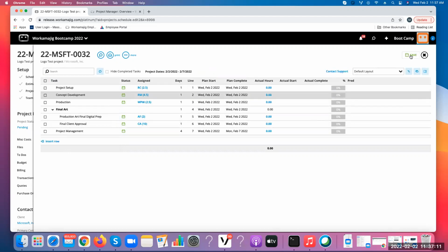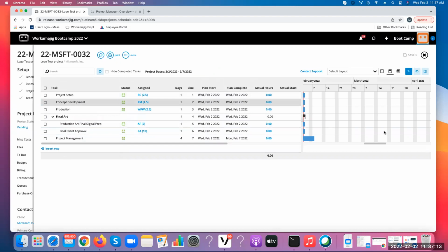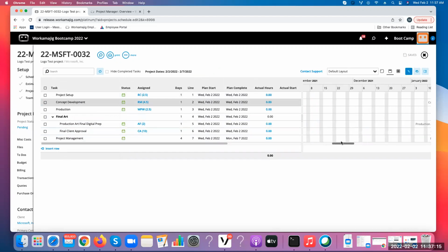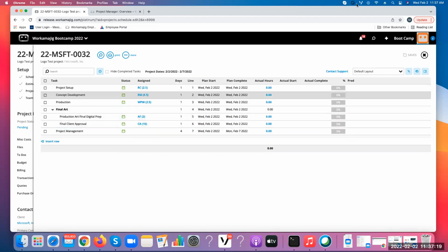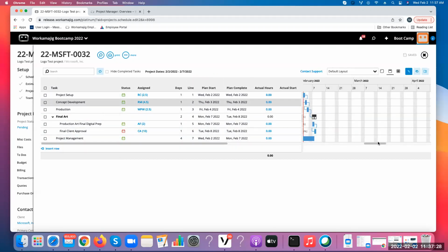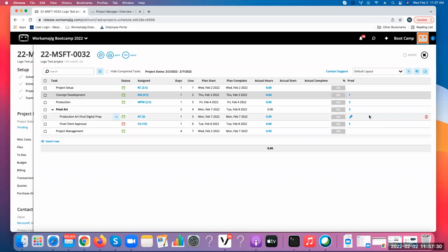And then I'm going to save it first, so make sure it looks right. If I look at my Gantt chart, oh, everything's starting on the same day. So you might say, well, that's not really what I wanted. I want to link them again. And it puts the predecessors back in. I'll hit save. And then you see a more traditional Gantt chart, and it is respecting the predecessors there.